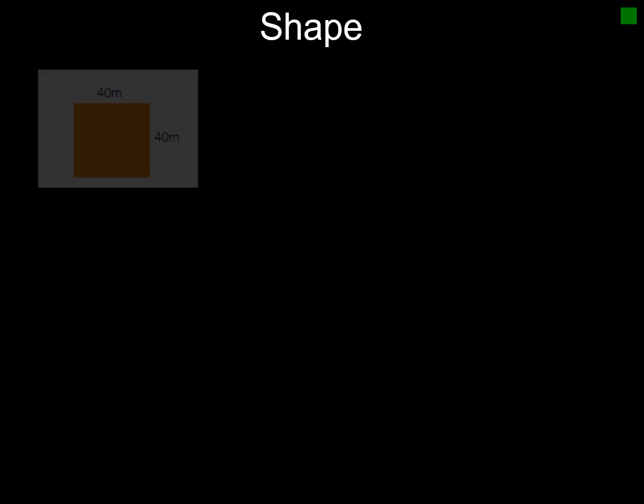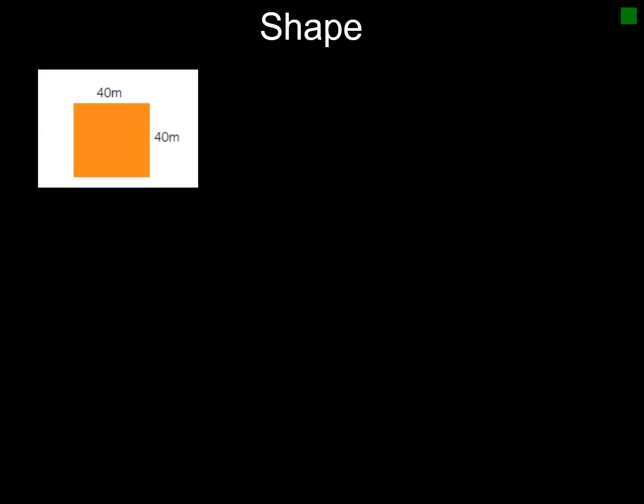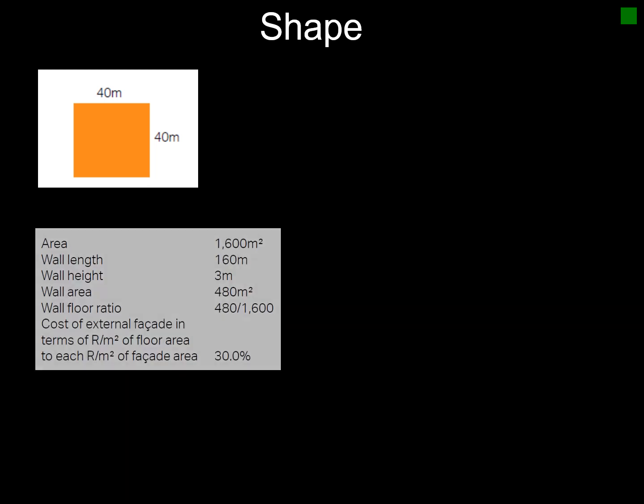This is background on the shape of a building and how it actually influences the project — very useful whenever you do your Task 1. We've got two shapes to look at. The first one is a square shape of 40 by 40 meters, and we can calculate that the total floor area is 1,600 square meters.